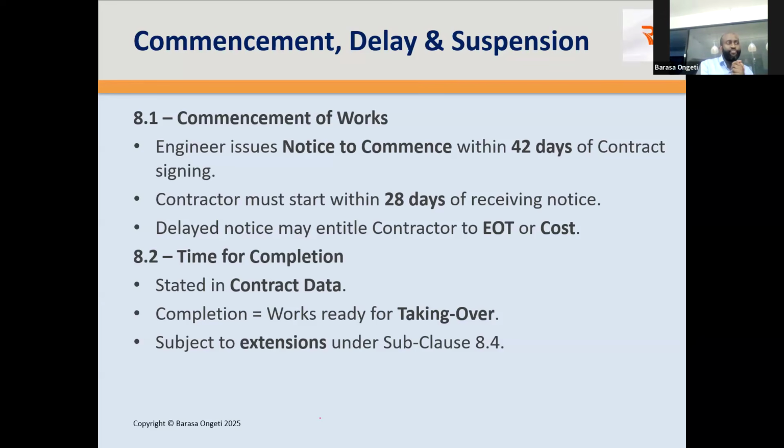or additional cost. We go to clause 8.2. Clause 8.2 gives you the time for completion. What's the time for completion? It's the period during which you should complete your project. We saw it in the graphic that I demonstrated a few minutes ago. And it's usually stated in what's called the contract data or the appendix to tender. So appendix to tender, we spoke about this last time.